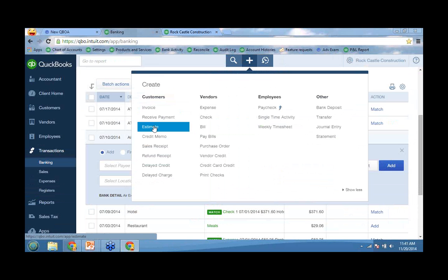So if you have clients that need what I say is robust job costing, if they truly need progress invoicing, especially where they're billing a third of the job now and a third later and a third upon completion, there's a workaround, but it's very cumbersome and tedious, and I suggest you try it out before you try implementing that with yourself or with a client.